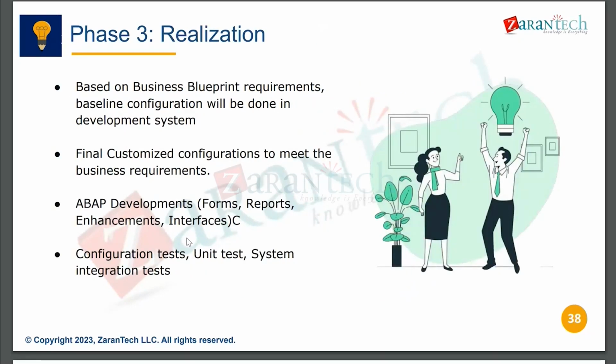Okay, so this is the business blueprint, requirement baseline, configuration. Based on the business blueprints, we'll do the system configuration, and we'll finalize the configuration part also to meet the business requirement here. And above developments, configuration test, unit test, system integration test will be carried over here.